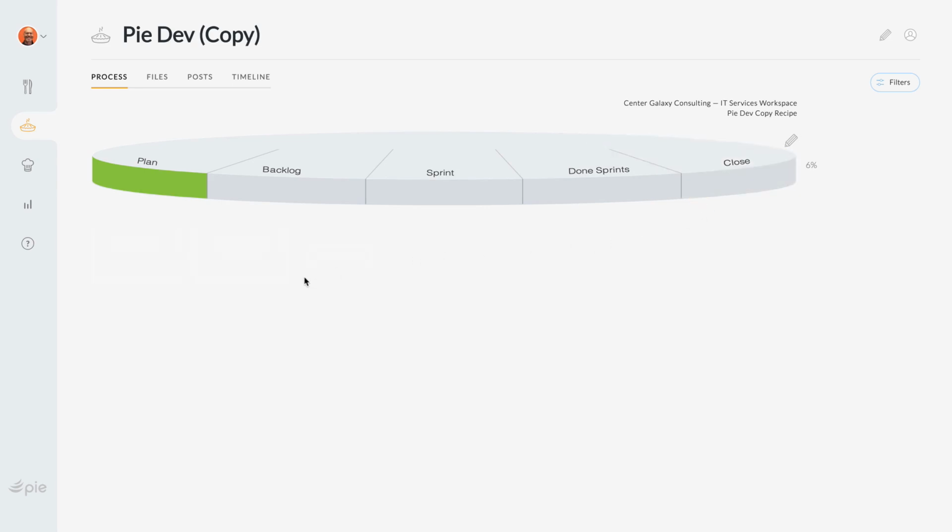So in summary, you've got sort of a sandwich view where the first part and the last part of the project are waterfall driven with specific best practices, process steps, using dependencies on their predecessors. And then you've got more of a fluid, dynamic, managing your sprints and your scrums with this agile process where you can deal with change very quickly inside the middle of the engagement here. So there you have a hybrid example, and I hope this was helpful. Thanks.